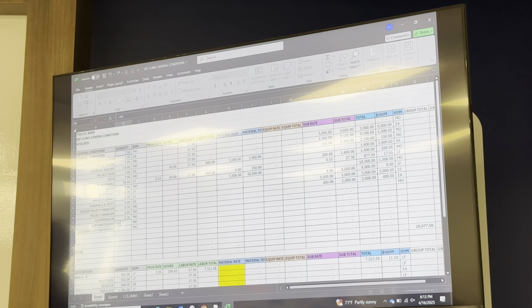And what I like to do is plus 0.5. So duration plus 0.5. That's adding 2 weeks to whatever we say the schedule is. More than likely your superintendent is going to show up a week early, start billing to the job and be somewhat present a week before you're really ready for him to start. And he's probably at least going to be out on that job site a week after the job's over, helping with move-in, just being present.